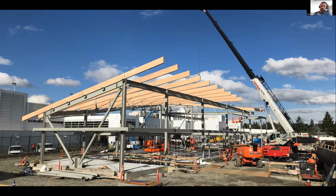And then once we replaced to the 50%, we were able to get about 30% reduction for the structure alone in all of our whole building LCA environmental outputs. And I knew that HOK had to come through with the curtain wall and the roof and calculate the whole building to figure out where we were in the goal. For LEED v4, before they changed it in 4.1, you had to get a 10% reduction in, I believe, 3 of the 6 categories. And we actually had 10 to 15% reduction in 5 of the 6 impact categories.